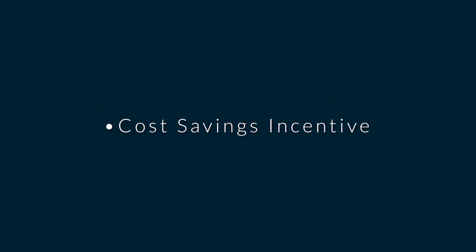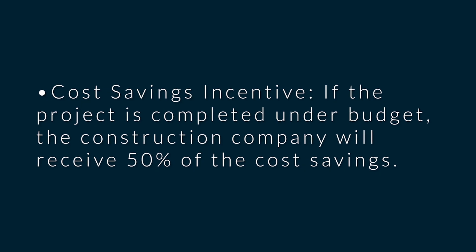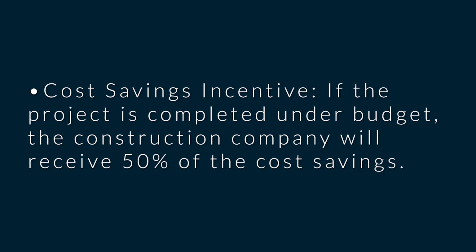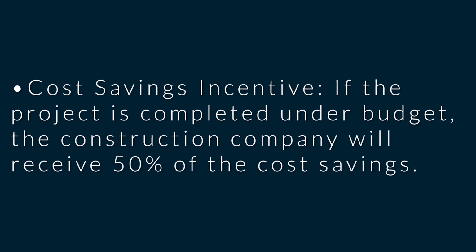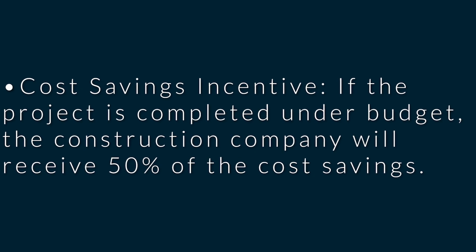Now, cost saving incentives, because that's another one. We said if you complete it early or under the budget. So in this case, the cost saving incentive: if the project is completed under budget, then the construction company will receive 50% of the cost saving.